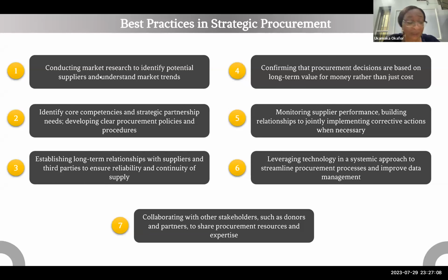And it may also be possible to develop indicators when they're having strategic procurement. They have to look at things like the quantity of products supplied, are they supplied on time? Are they supplied in full? You know, what is the shelf life at the time that they are supplied? So they need to monitor their supply performance and also evaluate at the end of the procurement process.